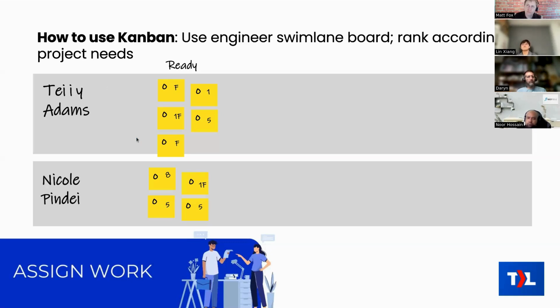So that is what you're going to be looking at this stage of the work, and that's why in Top Left, our recommendations are to have a board that's showing your tickets in the project swim lane, and another board that's showing them by the member swim lane. That's one of our key recommendations for project work, is to have those two types of boards. And this is why: in one mode, you're looking at the projects themselves, getting those ready to go. Then when you actually want to get those tickets assigned to the members to do that work, you look at it in this mode so that you can see who's assigned to what work, see who has maybe a shorter queue of work so that they're ready to take on more things, who has too much work already and you really ought not to assign anything new to them, and whatnot.